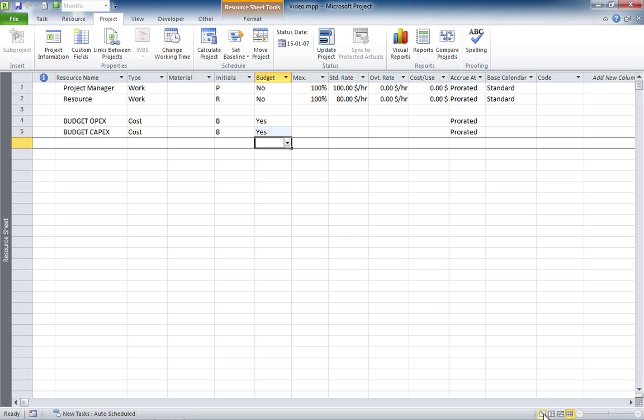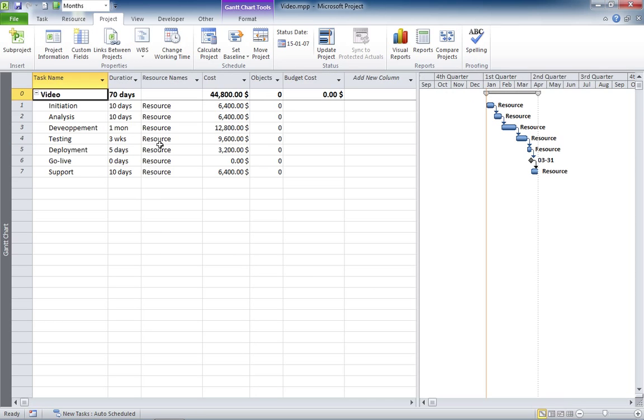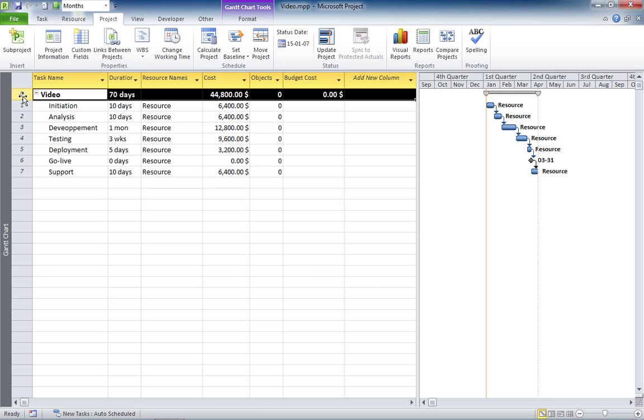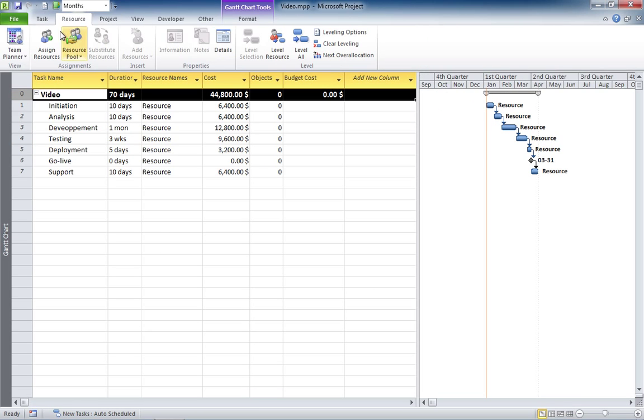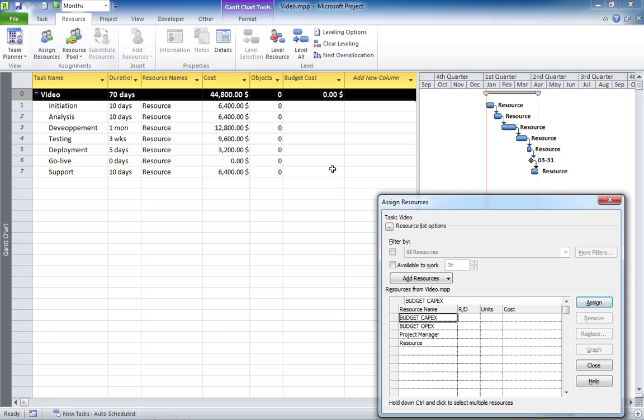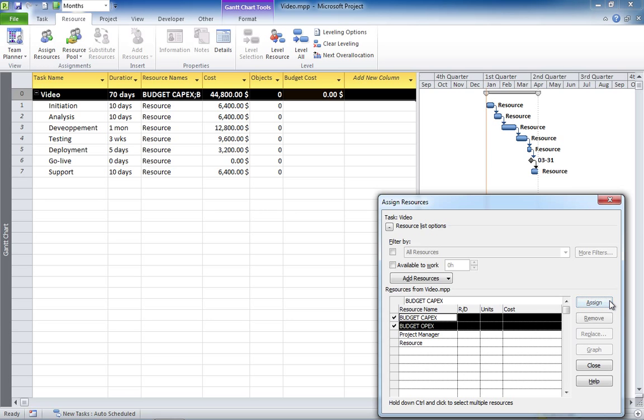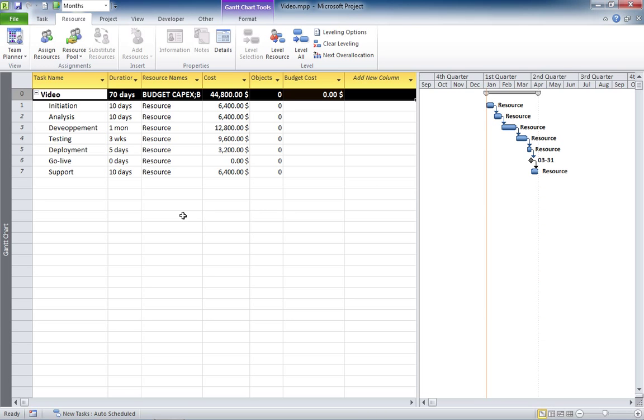Now, you need to go back to your Gantt chart, select your project summary task and assign those two budget resources to this task. There you go. Now, you have two budget resources, the budget OPEX and budget CAPEX that are assigned to your project summary task.